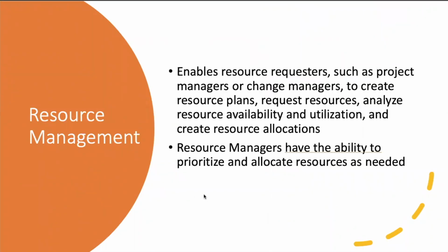So, resource management. This is a big piece of it. A lot of people want to do resources, but understand that resource management is a separate standalone piece to the PPS suite, right? It's integrated with project and portfolio management, but it's its own piece and therefore requires its own management. Resource managers should be separate from the project managers. Project managers should request resources, and the resource manager should be able to allocate those resources.